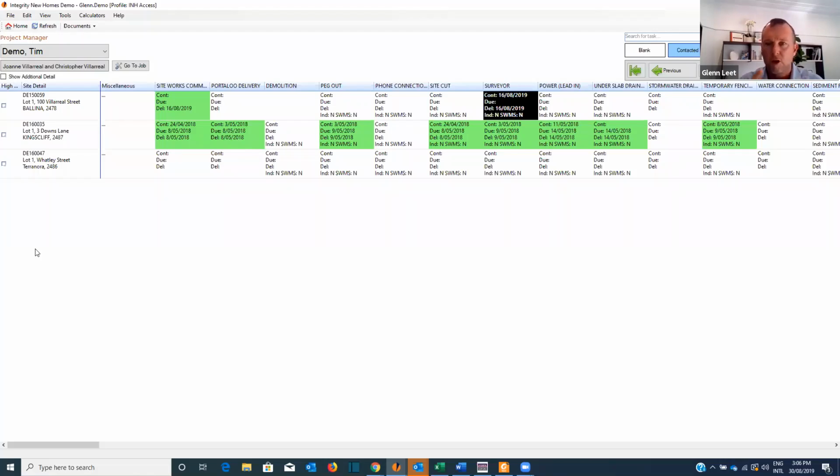So obviously you don't want to be commencing work on something. And interestingly, I had this conversation with a client this week where he's partway through construction of a renovation project only to find out that there was no DA approval. And so the task list is intentionally there to prevent you commencing something that you really shouldn't be commencing. So you want to know, okay, I've got DA approval and construction certificate approval.